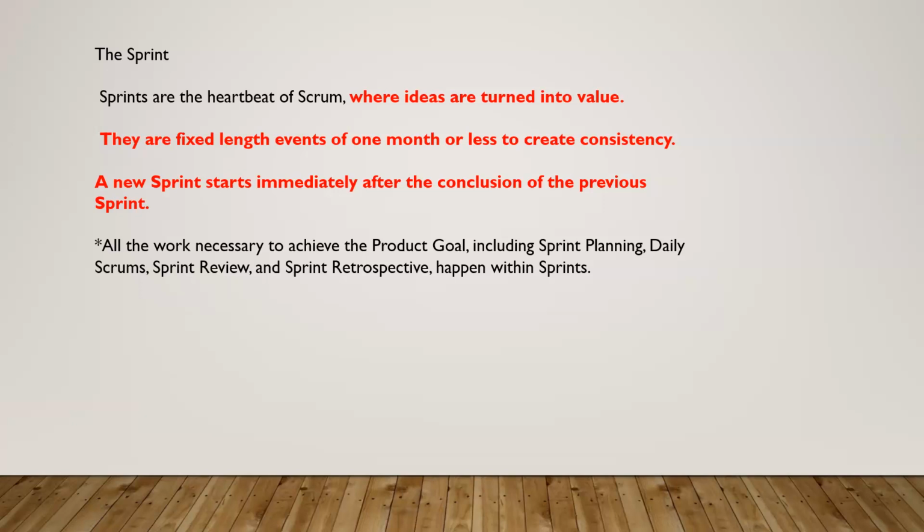In the sprint planning, you will come up with the estimation. You will say this particular task or user story is going to take this many hours. Let us say I say it's going to take almost 4 days. Then, as per the Scrum guide, we have to divide that particular task into smaller subtasks. That is what is actually prescribed. So you will take only those user stories which can be incorporated in this particular sprint.